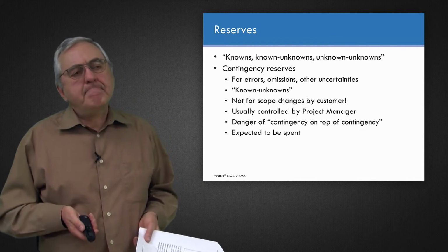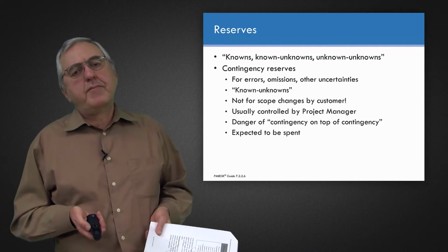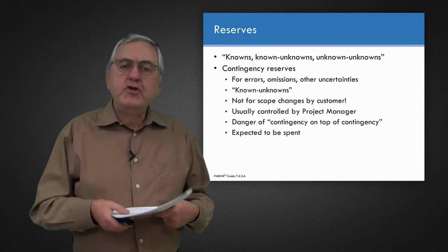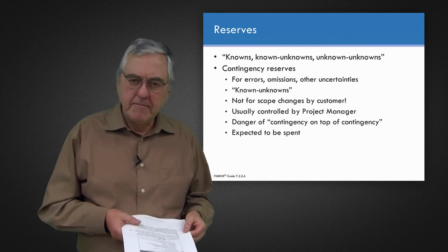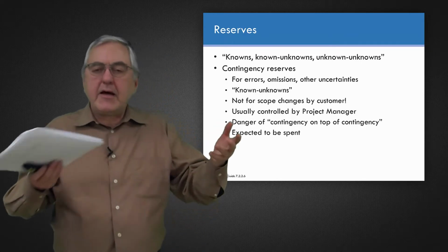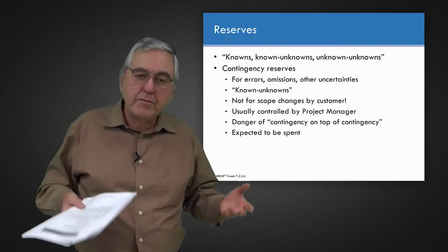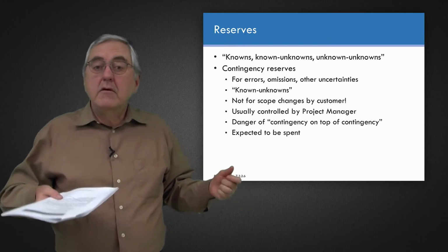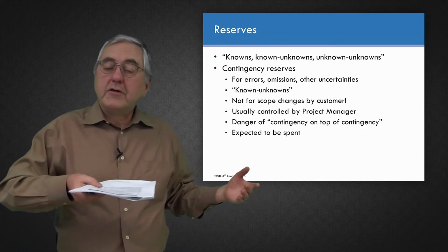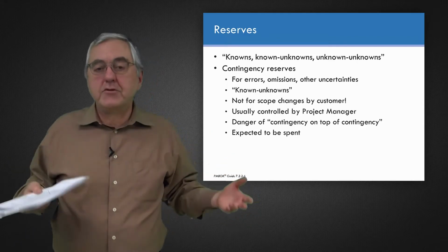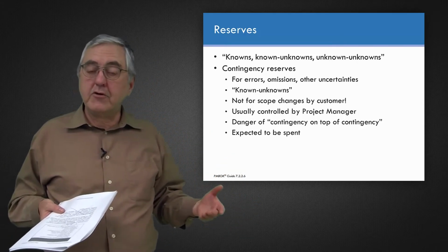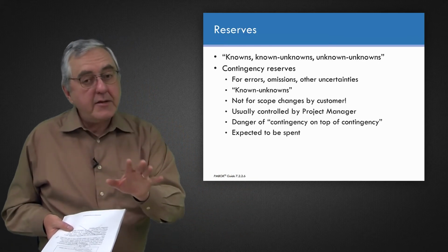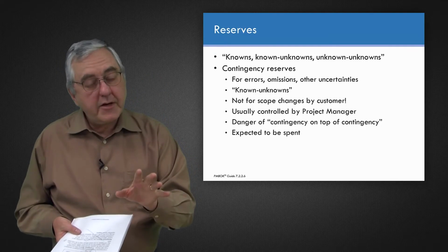And you also see the bullet point to my left, expected to be spent. Well, I do not mean by that that you should spend the contingency. I mean that given the context that I've just described about the purpose of contingency, we have to recognize there is the likelihood that some of those things will happen such that it will be used up. It should not be a surprise that the contingency reserve is spent as part of project costs. Now, if it is not spent, that's wonderful news. If you don't spend your contingency, that's great.